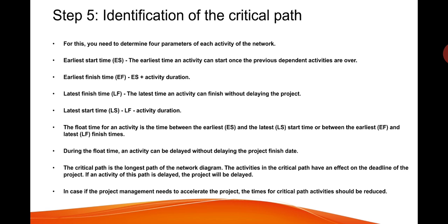Fifth step, for this you need to determine 4 parameters of each activity of the method. First, early start time. Second, early finish time. Third, latest start time. Fourth, latest finish time.